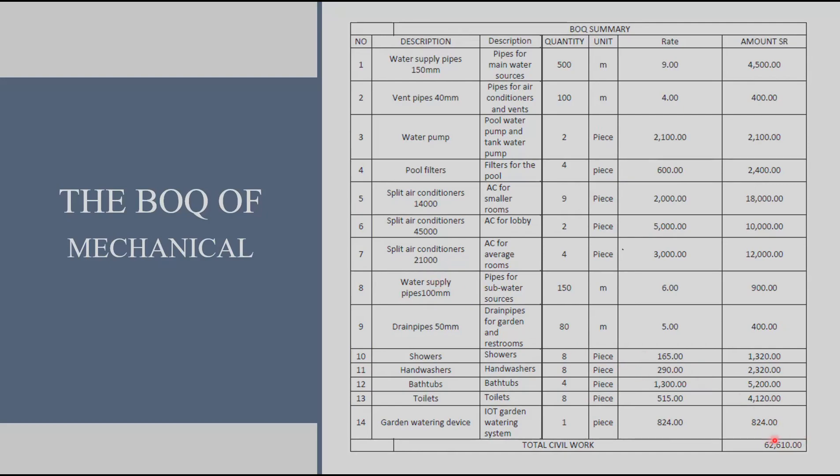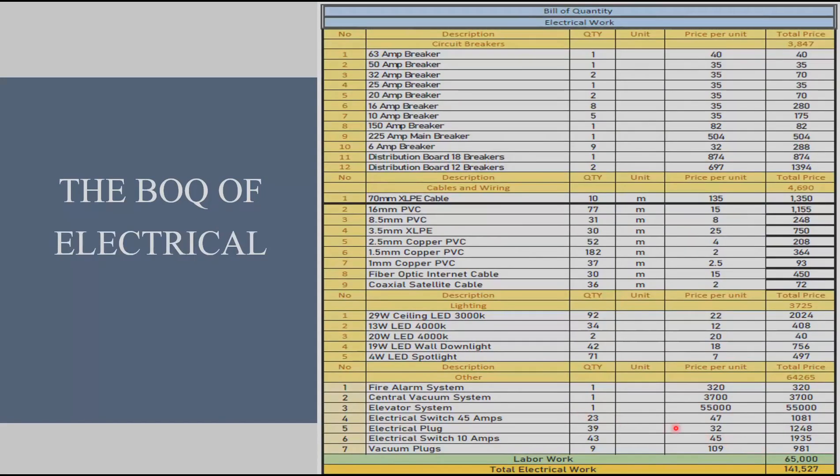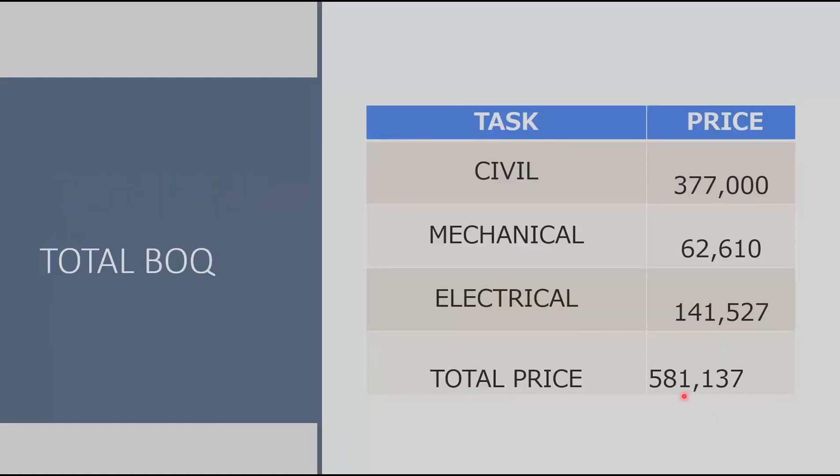And here we can see the mechanical BOQ and the total cost is about 63,000. Finally we have the electrical BOQ and the total cost is about 142,000. Here we have the whole estimation of the building's price which is about half a million.